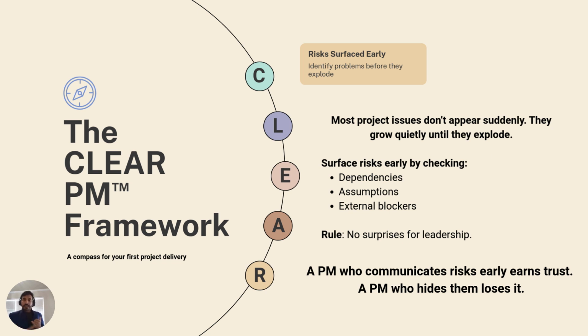Dependencies. Why is dependency a generator of risk? Because you are always talking to somebody else, or you are always dependent on somebody else to complete. If the person or the tool is not working in the way that you thought, it will be a risk. We assume a lot. We are people, right? We are not a machine.